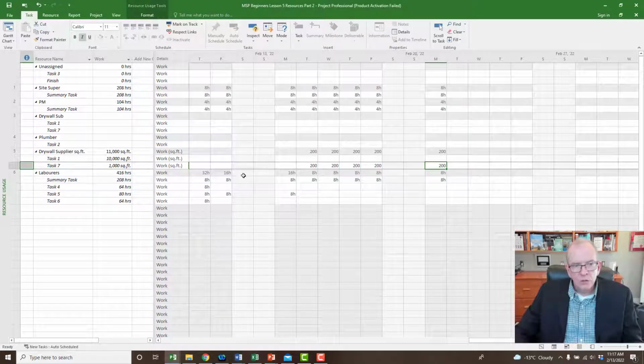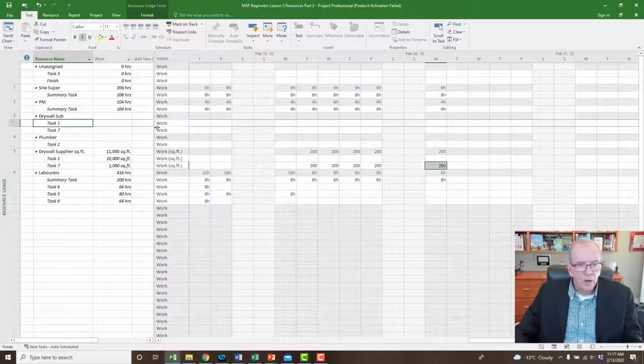Cost-wise, we're not too sure about costs on these items. I don't see costs. I only see hours of work. It won't show me subcontractors' hours of work because I put them down as a cost. I'm not monitoring them by the cost. Anything I want to monitor by the hour, like people that work for me, then I should have them down as work, right? So it doesn't show me what I've got as costs. See, I didn't put them as work, so it doesn't show that.